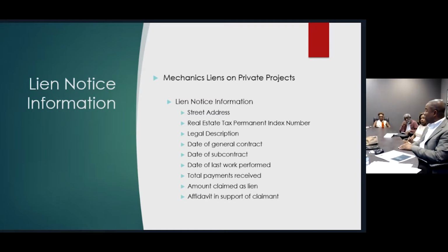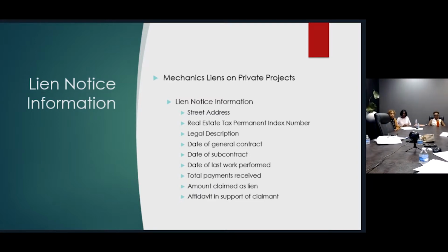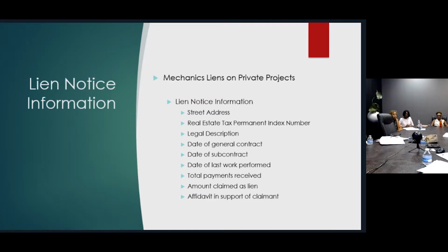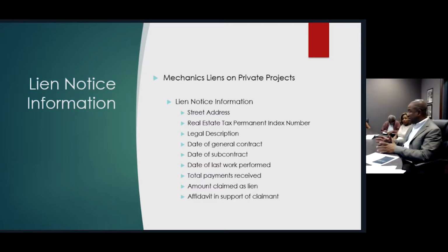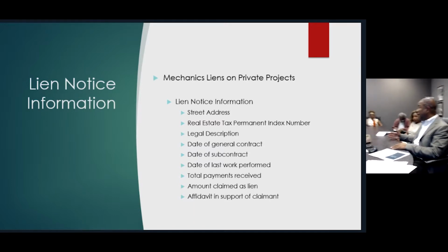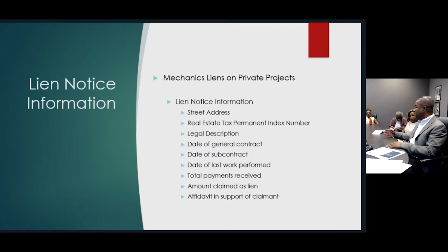Okay. If you perform the work and you're waiting for the proposal to be signed and sent back to you, that is not necessarily a contract. You have just performed work without having a contract in place. Got it. So, you run the risk of people doing strange things with a piece of paper once the work has been completed. Exactly. So the recommendation that I would give in that particular instance is don't do any work until you've got a piece of paper signed that says perform this work. Got it. Okay, thank you.